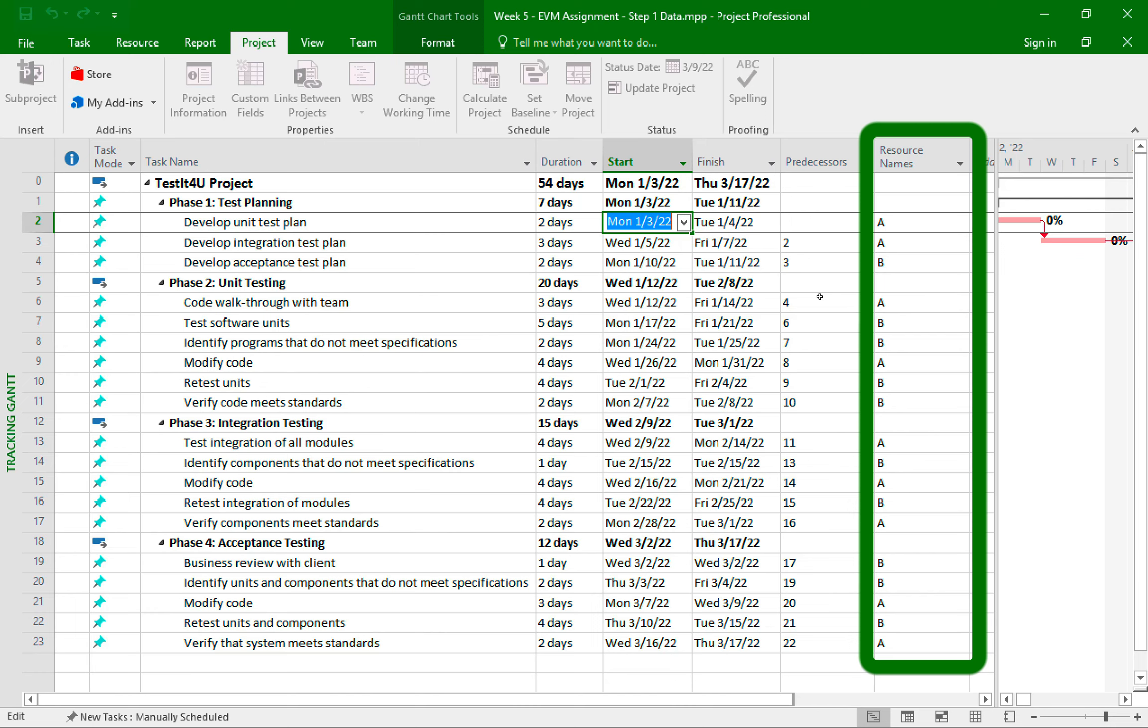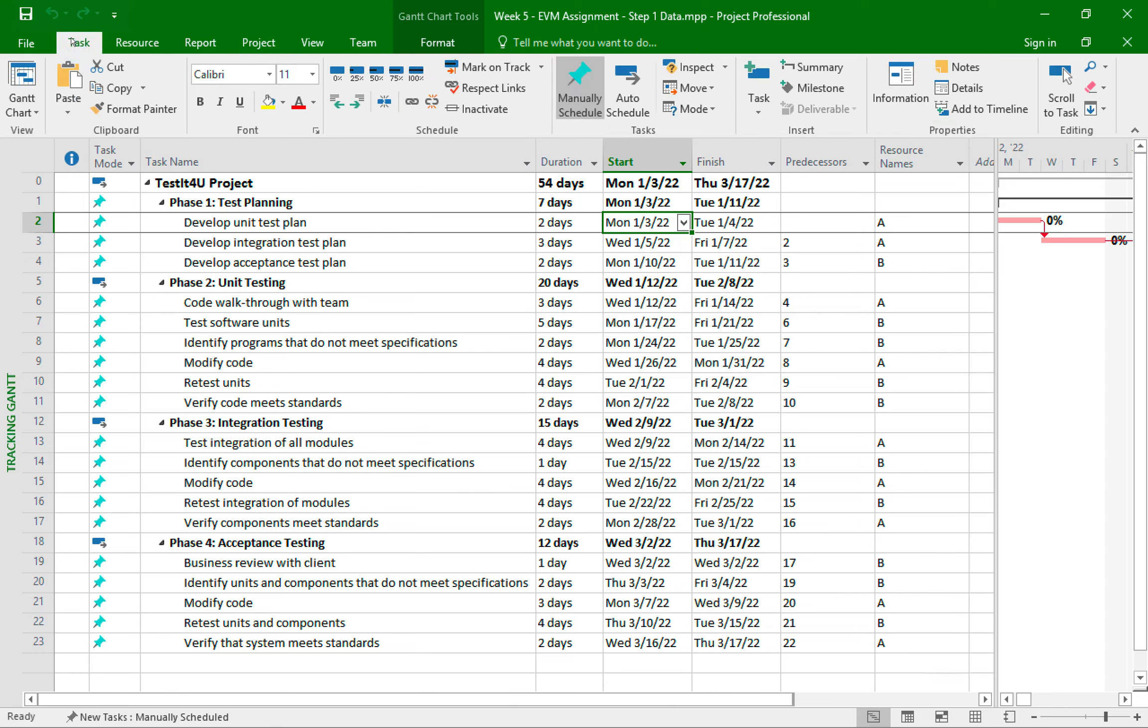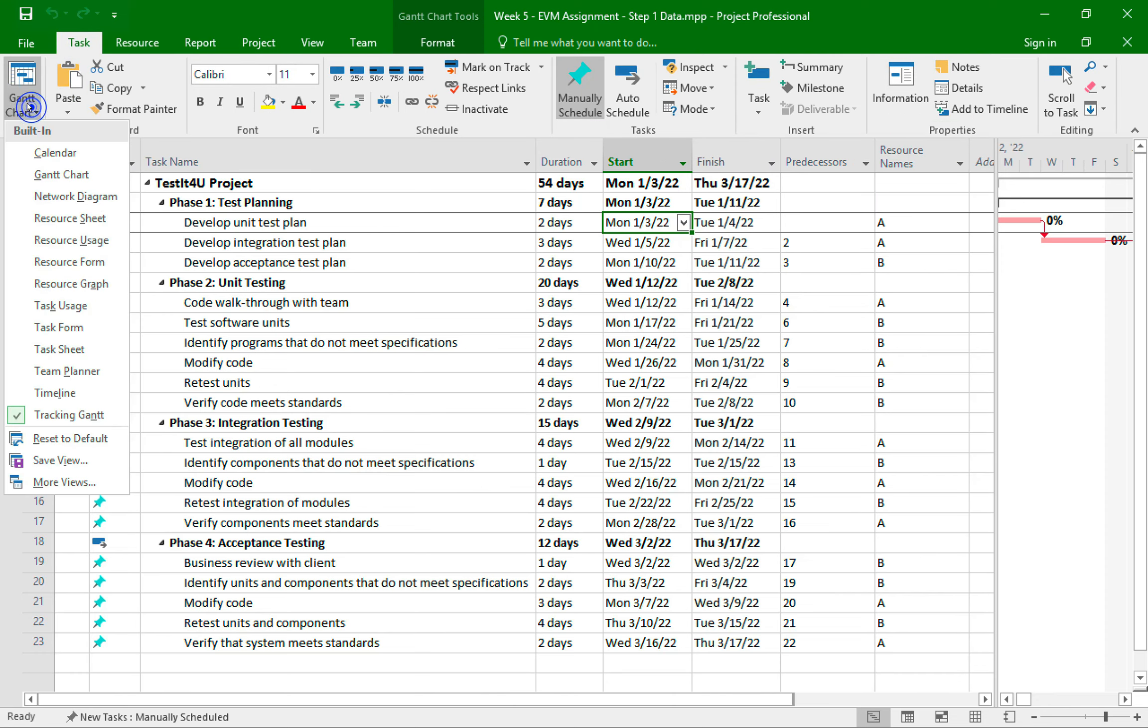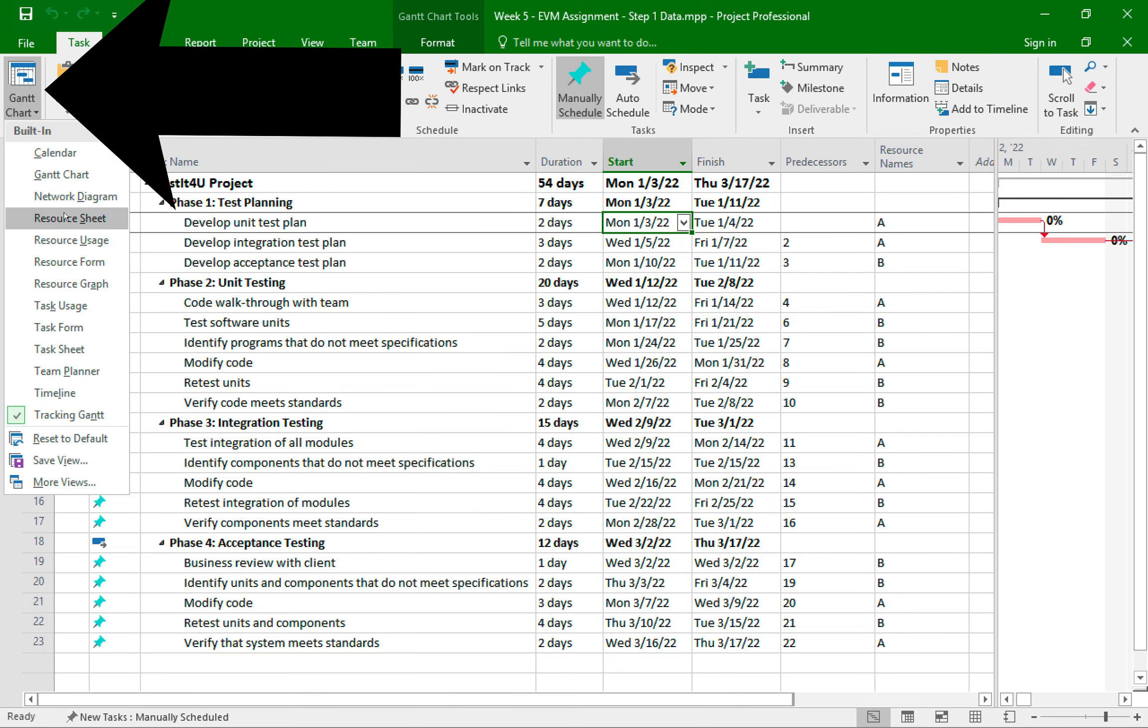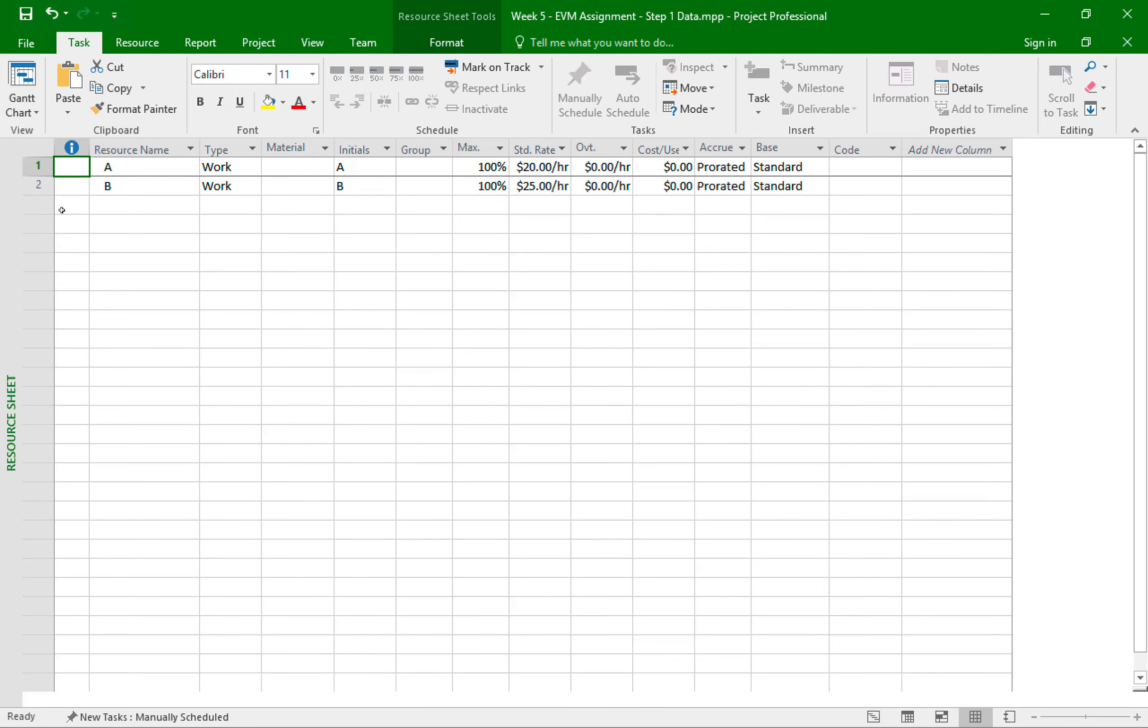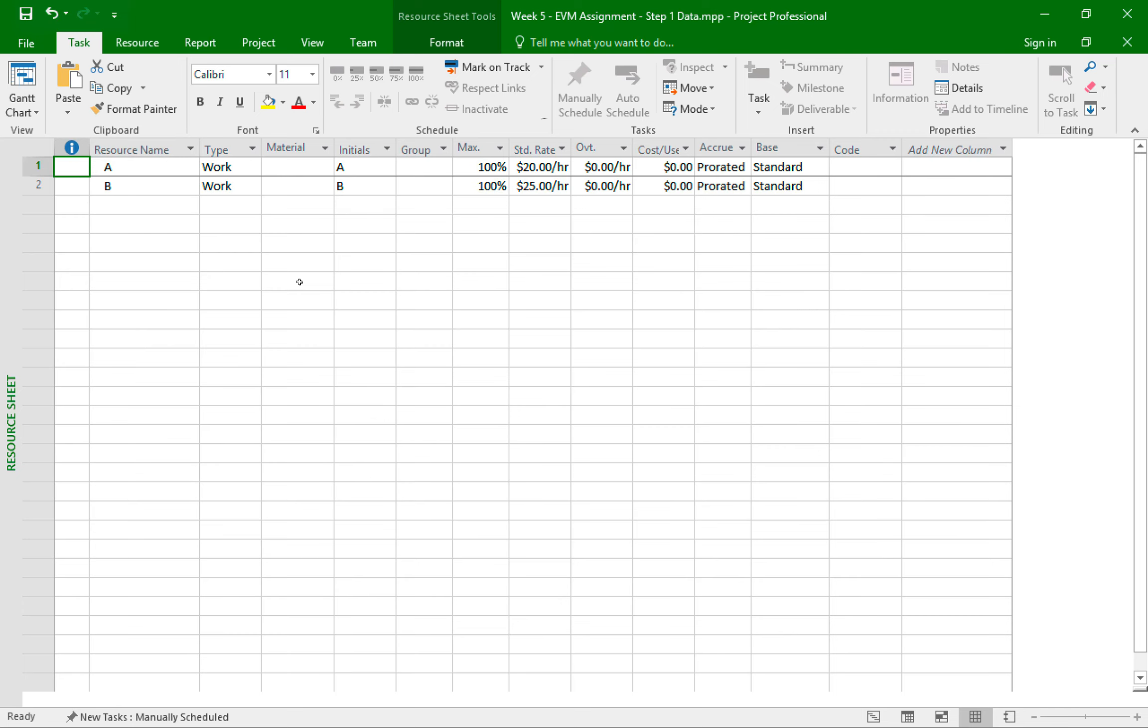Again, this is all based on the instructions of step number one in our assignment. In case you forgot where I add the details of the resources, I simply go up here and then I click on the resource sheet. This is the table where you can type in the names of your resources and how much they charge per hour.